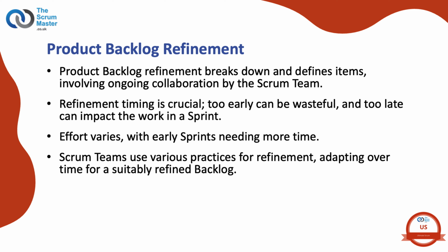It is common for product backlog refinement to occur in different ways. For example, developers may do it individually or in small groups with or without the product owner. The Scrum team may meet each sprint to carry out some product backlog refinement together to increase collaboration and transparency. Many Scrum teams create a workflow which ensures each product backlog item benefits from a combination of these approaches. The Scrum team should use Scrum to inspect and adapt to find the best combination of practices to enable them to maintain a suitably refined product backlog without introducing too much waste. The practices to achieve this will emerge over time.